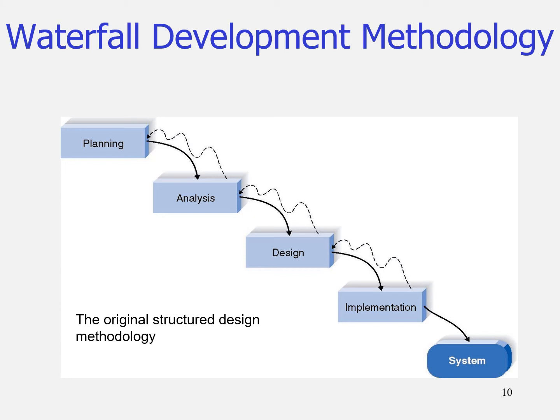And then it's ready. Okay, so in the different methodologies, the phases are normally the same. Maybe sometimes the name is slightly different, but they are doing the same job. Okay, so this is waterfall. So waterfall is that you finish planning. After you finish, then you move to analysis. And after you have done analysis, you do design. You do one by one.